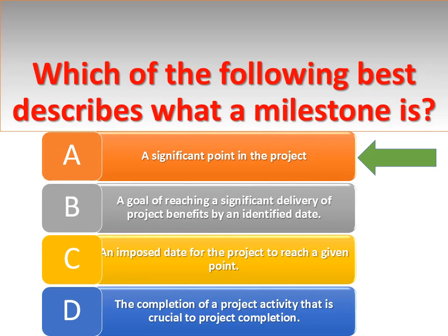In addition to signaling the completion of a key deliverable, a milestone may also signify an important decision or the derivation of a critical piece of information, which outlines or affects the future of a project. In this sense, a milestone not only signifies distance traveled but also indicates direction of travel, since key decisions made at milestones may alter the route through the project plan. To create a milestone, enter 0 in the duration field. The task will automatically be classified as a milestone.